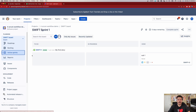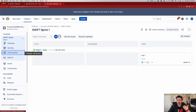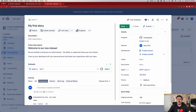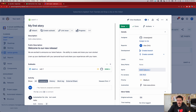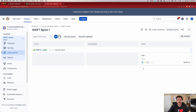Actually, it's super easy to find if you know where to click and where to look. I'm going to go back to my Active Sprint. Notice that my URL has not changed in any way, shape, or form. But the trick to get this URL to change is to click on a story that you have planned for this Sprint. When you click on it, you will notice that when the pop-up shows up, there's a field on the right-hand side called Sprint. If you hover over the value for Sprint, depending on your browser, you may get the URL on the bottom left corner. But in the unlikely event that it doesn't show up, all you got to do is click on that value. And when you click on that value, notice that the URL on top has changed.